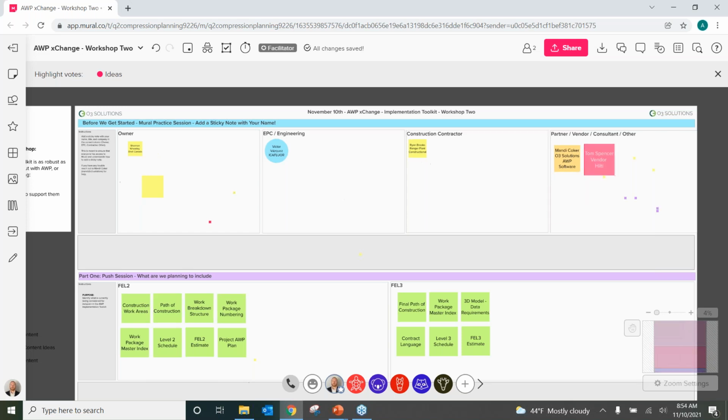Well, there are a lot of companies now employing this and saying, hang on, maybe for one massive cable pull, we might have an IWP that's 1,200 hours. So we can't stick to that. Or for smaller work, we might have IWPs that are 200 or 300. I've seen companies and contractors who stipulate your IWPs must be between 500 and 1,000 hours, and then they find that creates an unnecessary block, a wall you can't go past. So the lesson learned is that they can soften it to say our operating standard is that they should typically be between 500 and 1,000 hours, but by exception, they can be greater or smaller than that, especially on the smaller end.